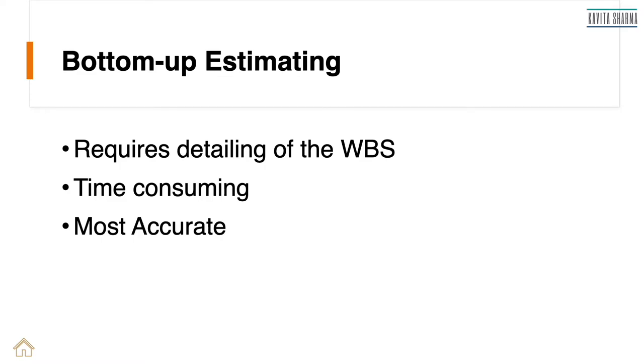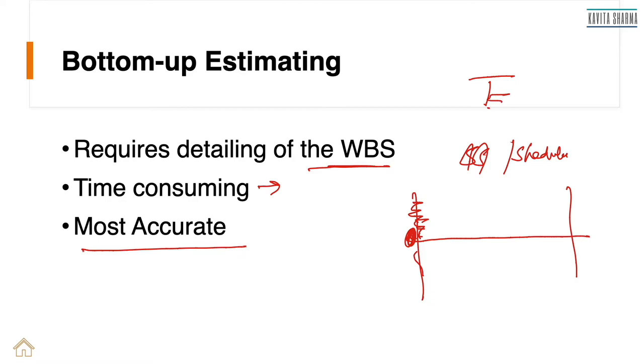Bottom up estimate is extreme opposite. You're putting in a lot of effort to detail down the WBS. It is time consuming, but it becomes very accurate. When do you want to do it? When you are starting off with a phase, at the starting of the phase, you would want to look at each WBS item. You're going to be planning for this middle of phase, overall cost or overall schedule. At this point of time, you work with your team and elaborate the WBS and say, okay, these are the points. What are the risk items? Who's going to be doing it? What is the total cost and so on? And you arrive at a good estimate at the start of the phase.